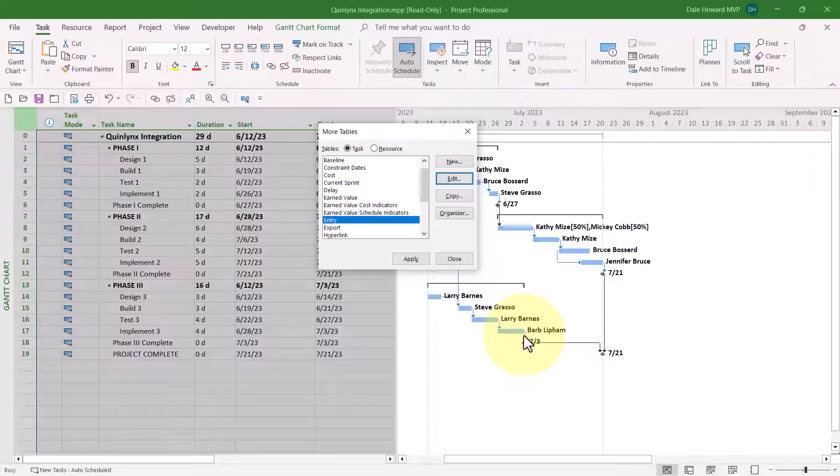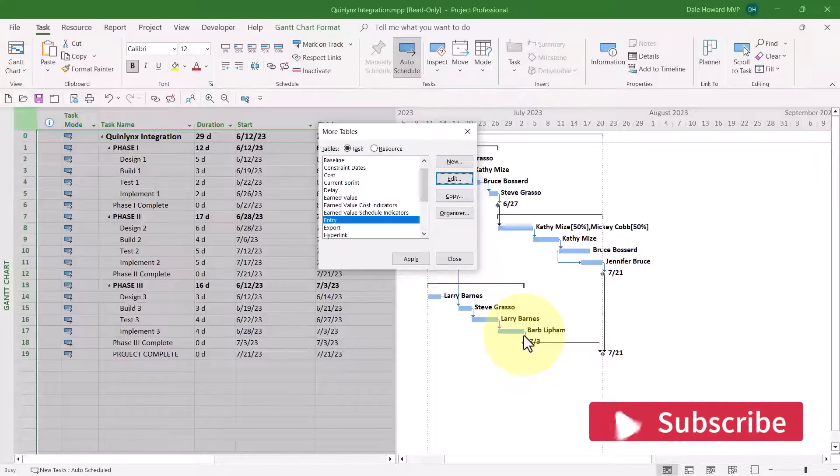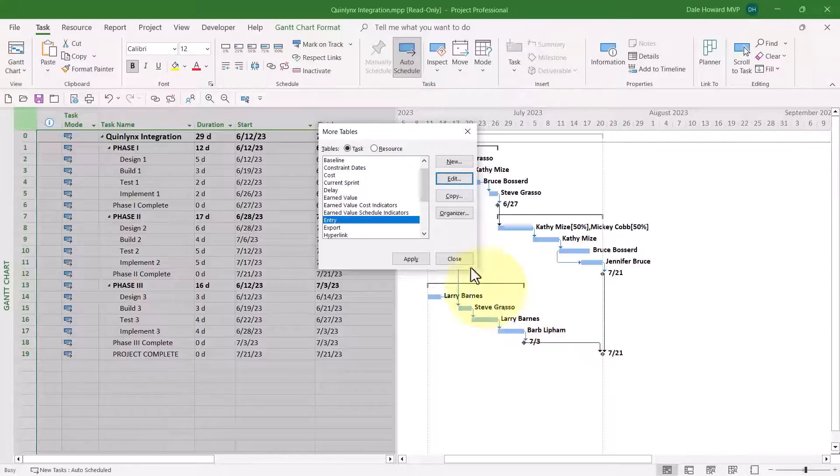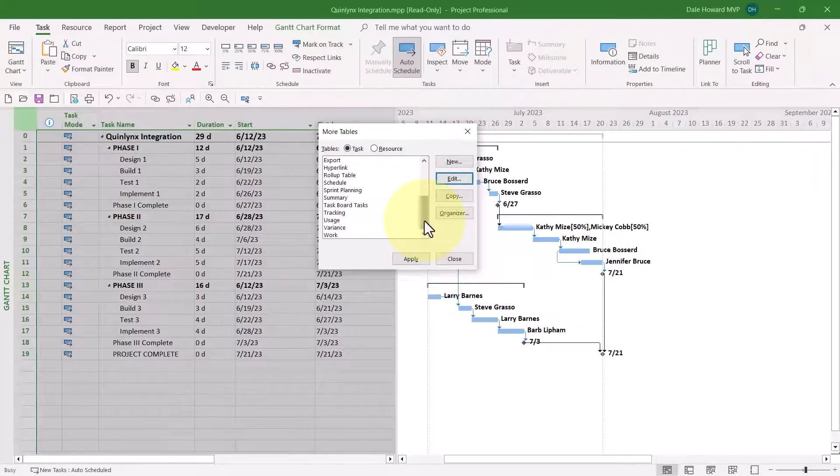Here's some good news for you. The Entry table is shared in common by three default views. They are the Gantt Chart view, the Tracking Gantt view, and the Task Sheet view. So if you make a change to the Entry table, that change impacts three views. Now, I do recommend that you change the Date Formatting in a couple of other tables as well for the sake of consistency in the views and the tables you use.